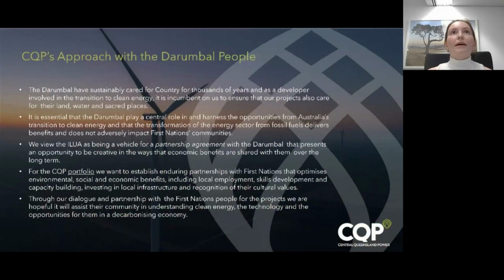So just a little bit more about our connection and approach with the Darumbal people. So the Darumbal, as I mentioned, are the traditional custodians for the region where the project is. And it's really important for us to engage with them and make sure that they have the opportunities to participate in this energy transition through our project and our portfolio of projects. So as I mentioned, we have a voluntary cultural heritage management plan, which has been registered with the State Department. And our land that we're using for the project also has native title still intact. So there's an ILUA, which is an Indigenous land use agreement that we require for the project as well.